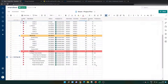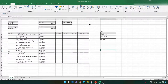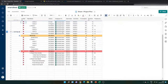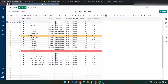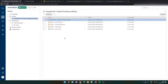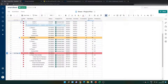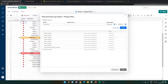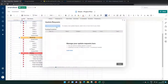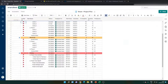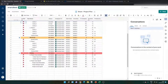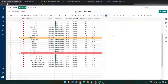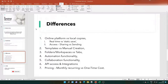Following on is collaboration. With Excel you're saving copies, sending copies — it's a bit of a nightmare requiring a shared working space like Google Drive. In Smartsheet everyone has their own account, visits smartsheet.com, logs in, and if they're shared to a sheet it appears in their account. There's also an activity log that records all changes, the ability to send update requests, and conversations within sheets where people get notifications when you message them — all collaboration functionality you just don't get in Excel.